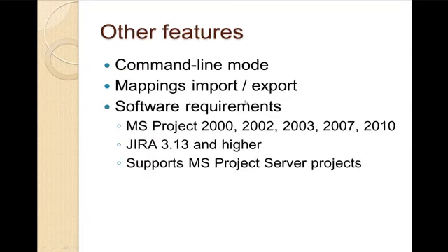And the other features of the bridge worth mentioning are command line mode, which is a command line utility you can use to synchronize data between Microsoft Project and JIRA. It exposes the same functionality that the UI version has, but it can be launched in a command line mode, and you can schedule it to run in the night or in some scheduled scenarios.